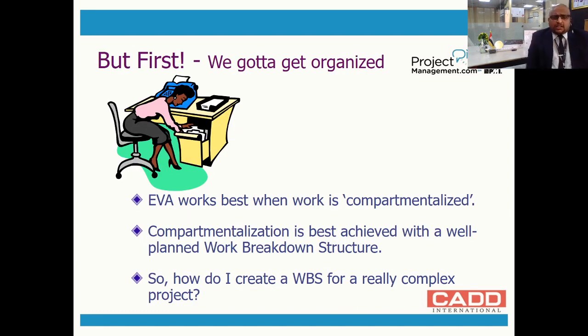To implement the earned value analysis, the first thing we have to do is make the project in a proper compartmentalized method. That is, a proper work breakdown structure should be there in the projects to implement the earned value analysis. Why do you need a proper breakdown structure?